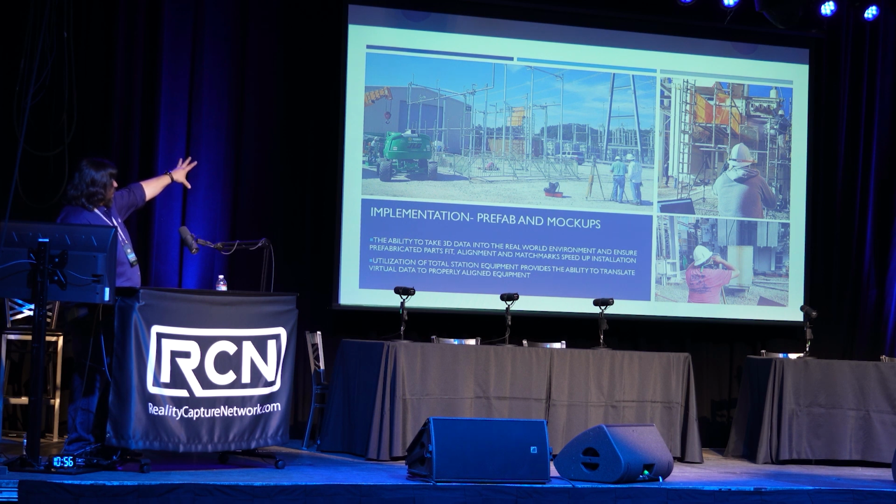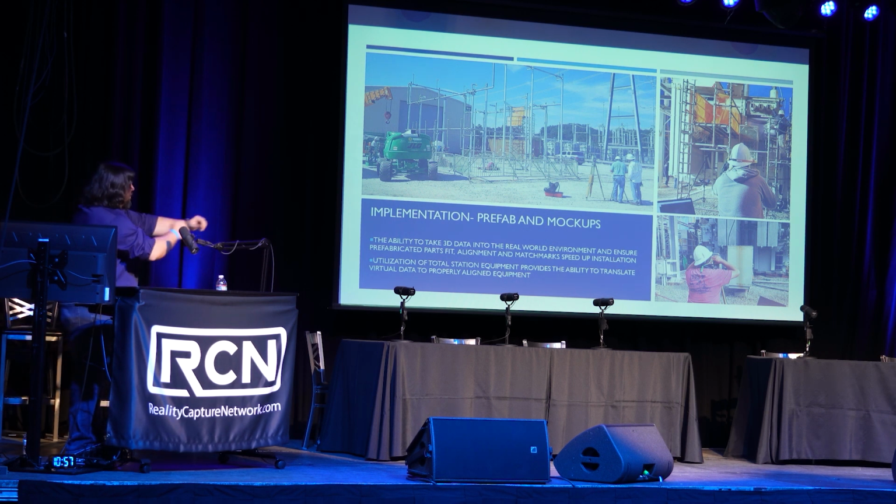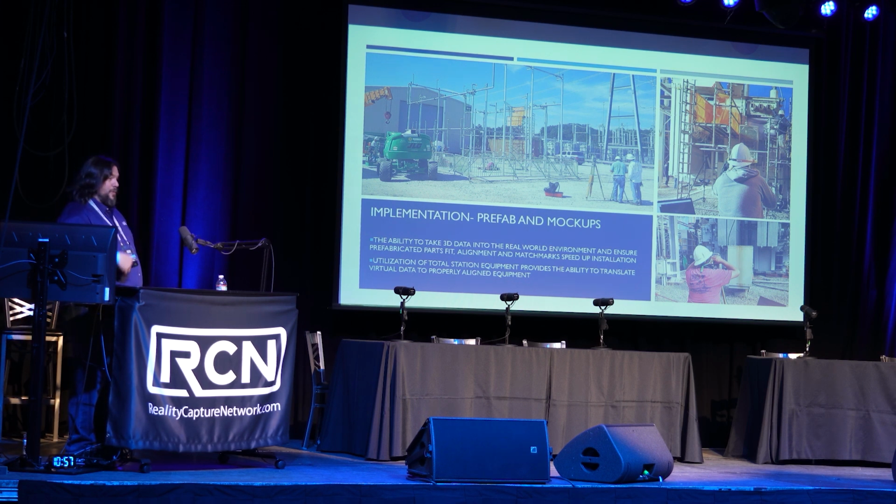The weld crews fabricated all the deluge system, and then we mocked up the actual deluge system using our total station and spatial analyzer that we use for doing our position layout. So we were able to orient and make sure the whole deluge system is set square, because in those outages we only have about 3 weeks to remove a 1 million pound transformer, put a new one in, fabricate the whole deluge system around it, and connect all the electrical connections.